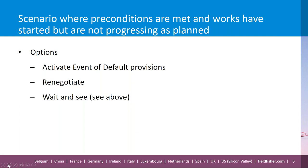Returning to the scenario where preconditions to the development agreement have been met, works have started but are not progressing as planned: the council can look to activate the event of default provisions within the development agreement — there is normally an obligation to commence works and continue them diligently. The second thing is to renegotiate the development agreement obligations, extending time periods and perhaps replanning what sort of works will be undertaken. The third option remains active wait and see: actively monitoring, recording, and having a good understanding of what the developer is proposing going forward.